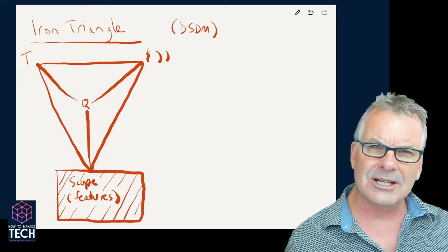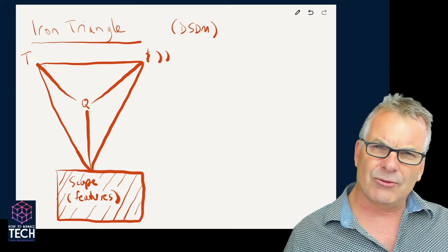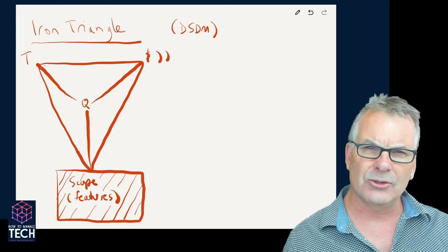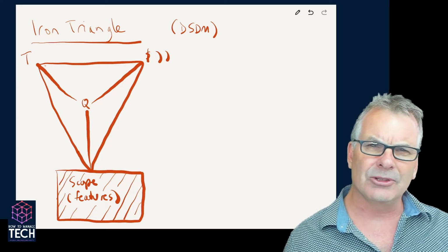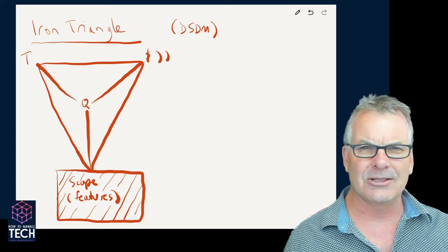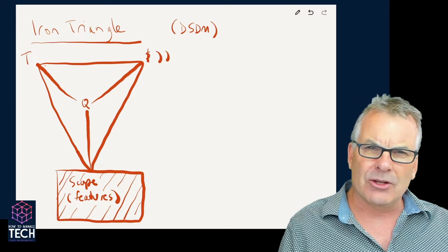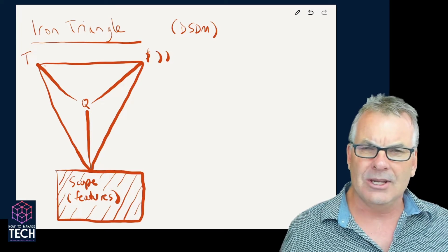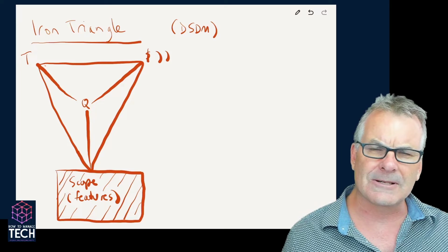Eventually, in desperation, when our deliverables start to get rejected because of poor quality, we start to de-scope features from the solution. If we're not careful, we've left absolutely critical core features to the very end, and de-scoping them is an instant project fail. So we end up having gone over budget, over time, and delivering something that doesn't actually work. This does happen routinely with projects.